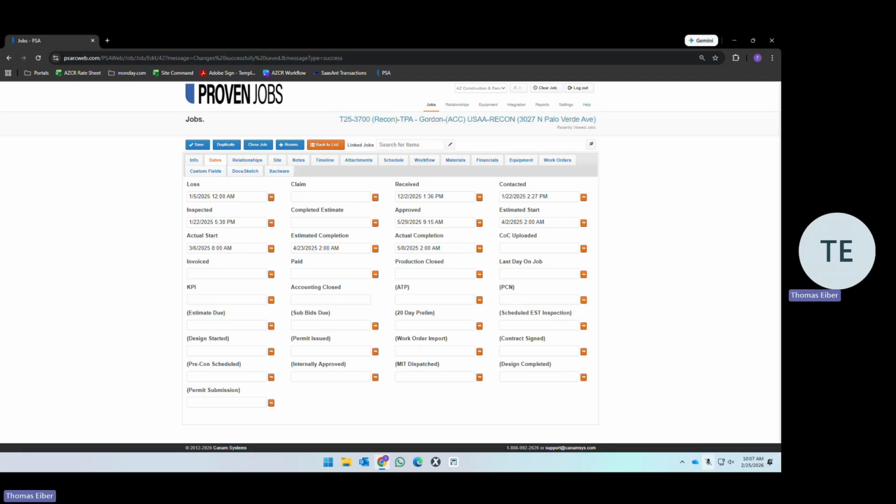Moving on to our fourth section, we've got deliverables. We spoke about this before, but more specifically, the main outputs: your assignment to PMs, the pre-con walk, and calendar invite are very important upon the beginning of a job. The consolidated job progress updates in PSA and TPA portals, very important. Any delay notifications to client, carrier, TPA, those are outputs required by you. When things happen, the delay notification has to come from you because PMs will not be in XA, letting them know about certain delays. And the PCN to AR for job completion.